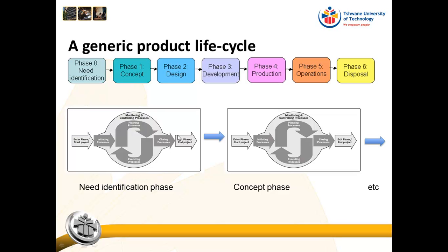At this exit point, there is also a decision point where the client or the sponsor can decide, all right, based on the results of the need identification, are we going to go on into the concept phase? And if we decide to go into the concept phase, we will again initiate the concept phase.